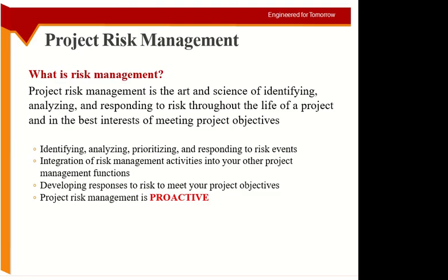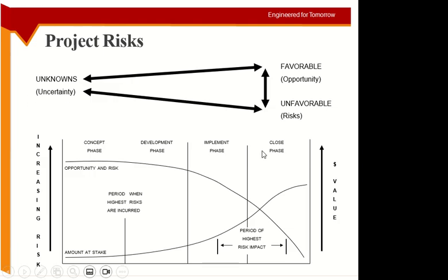What is risk management? It's the art and science of identifying, analyzing, and responding to risk throughout the life of the project. This is what I was saying: you have to respond to the risk. You cannot control it. There will always be risks. At the initial stage, the risk impact is lower and uncertainty is higher. It becomes the opposite as you go along the project. So you have to control the risk according to this throughout the project.